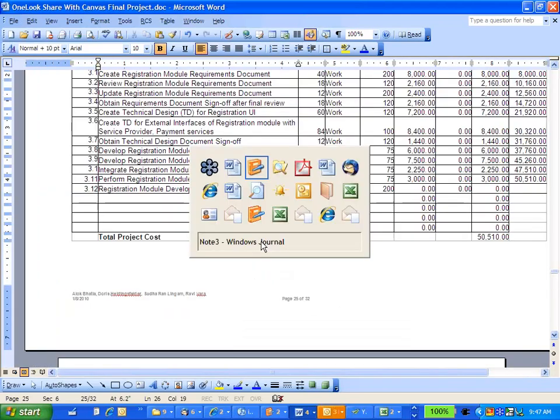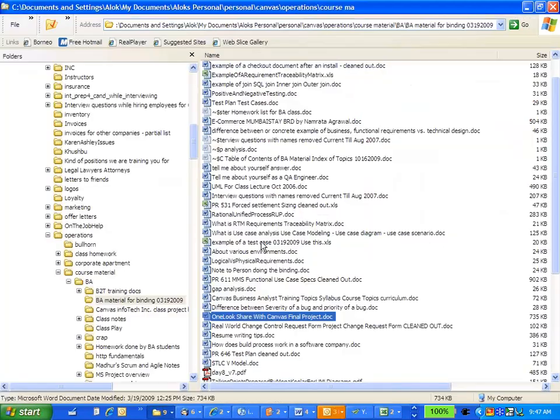So there you go. That is your discussion about risk management. It's common sense, except that you have to say it in the right words. Talk about how you go about doing risk management. You do risk identification, risk analysis, risk response planning, and risk monitoring and control. And then how do you deal with the risk? Preventive, mitigative, contingency plans, and transference.